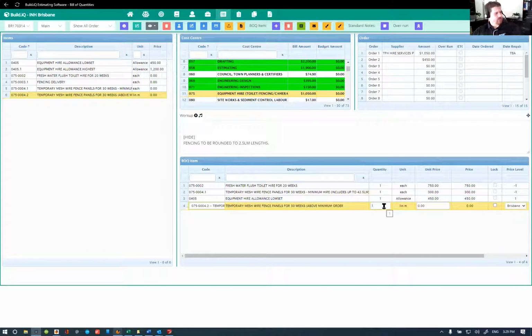It allows them to do less strapping and less carpentry work because they can carry that tie down from the slab all the way through the top plate. History would suggest that the tie down and bracing's in the vicinity of about $800 to $1,000. So I'm just going to put that in there.